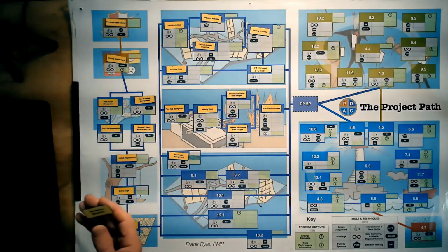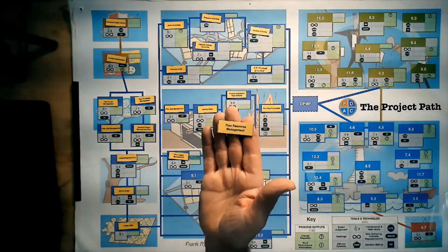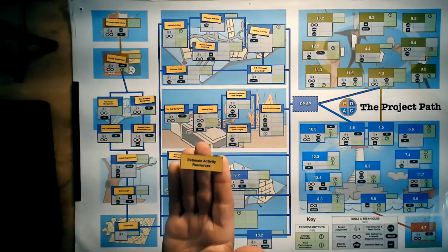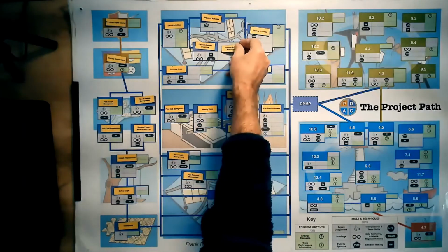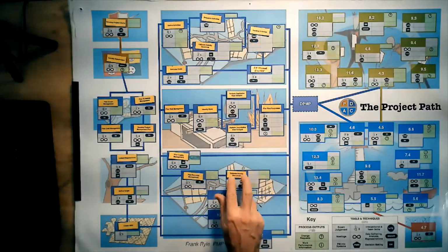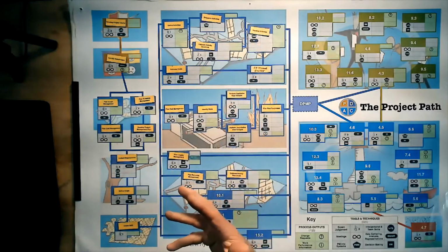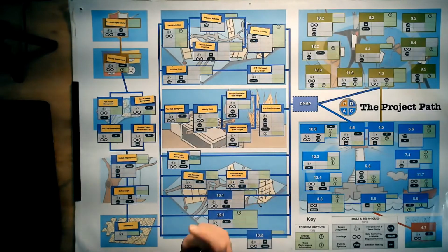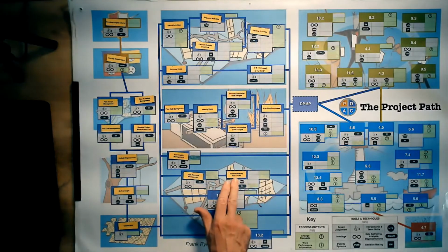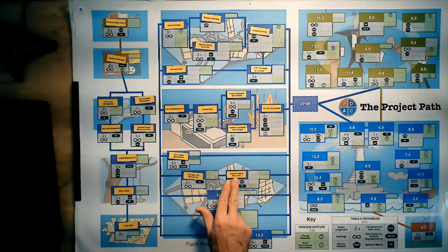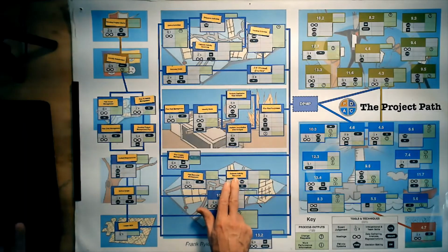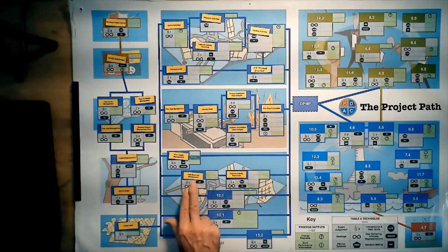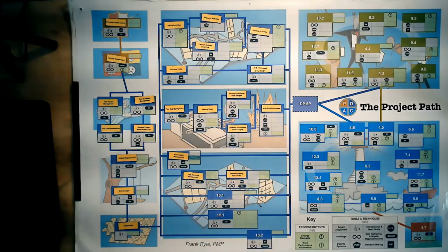Now we have two in resourcing, and this is a relatively new one to PMBOK 6. So we plan resource management, and then we estimate the activity resources. Now for those of you who know, that used to be up here in PMBOK 5, but we've moved it down here. But basically, I should draw another line. It might become too complicated, but we have plan resource management and estimate activity resources. Big change here, we're using the word resources, not human resources. Okay, so just make sure you catch on that. This is estimating helicopters and conference rooms and bandwidth, just as much as you're estimating humans, okay? So we plan resource management, estimate activity resources.